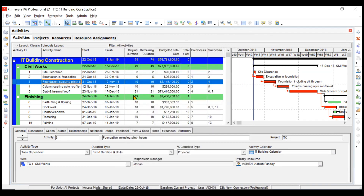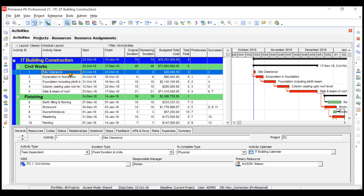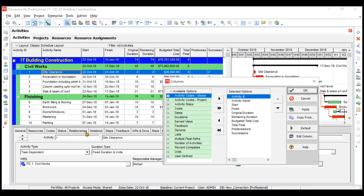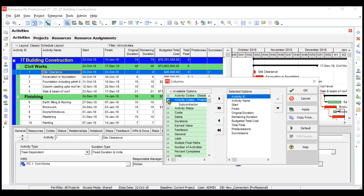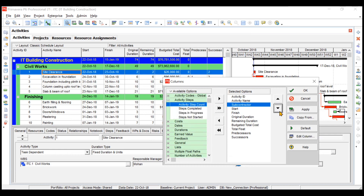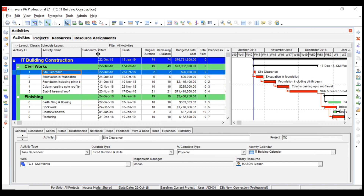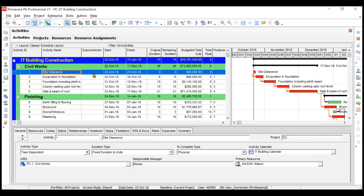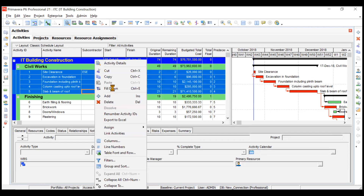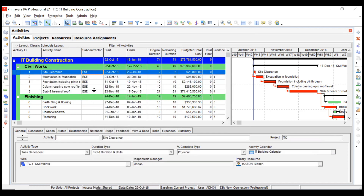Now it's time to assign these activity codes to the respective activities. You can add a subcontractor column by going into Columns, navigating to Activity Codes > Project, and adding the subcontractor column — maybe after activity name — then click OK. Now the subcontractor column appears. You just need to define which activities are undertaken by which subcontractors. For example, for site clearance, choose ESC Private Limited. To fill all civil works activities with ESC, press Shift to select through the last one and use the fill-down option. This will fill ESC to all selected activities.